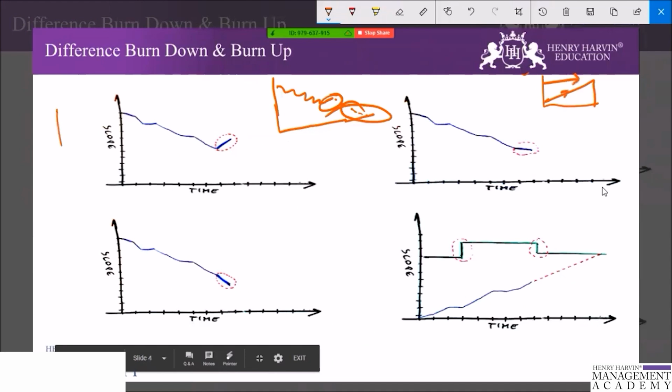So this is again a burn down chart, and if we see here, we see something has changed in this burn down chart. And what is it that changed? It clearly says that otherwise it would come down, but this has come up, which means some work has been added, right? And unfortunately, if the time of addition and work completion is the same, it will show the line in this manner, rather than in this way.